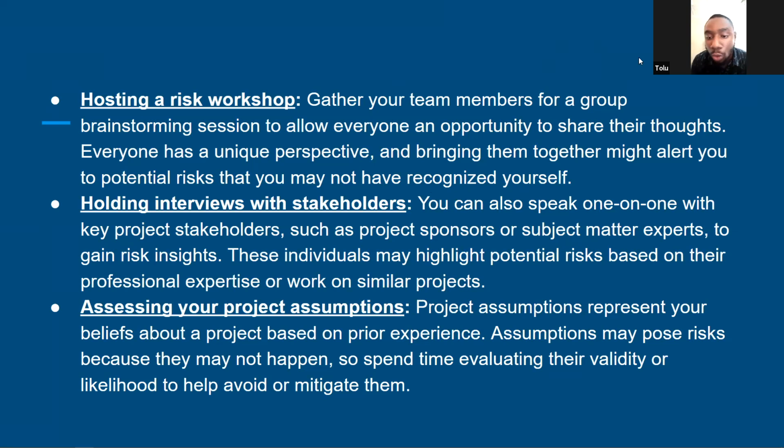You can also speak one-on-one with the key project stakeholders, such as the project sponsor or a subject matter expert, to gain risk insight. This individual may highlight potential risks based on their expertise or work on similar projects. So you can meet with stakeholders, people that have done the same project before, that are more experienced than you. You can ask them, "While you were creating this project last time, what risks did you face?"